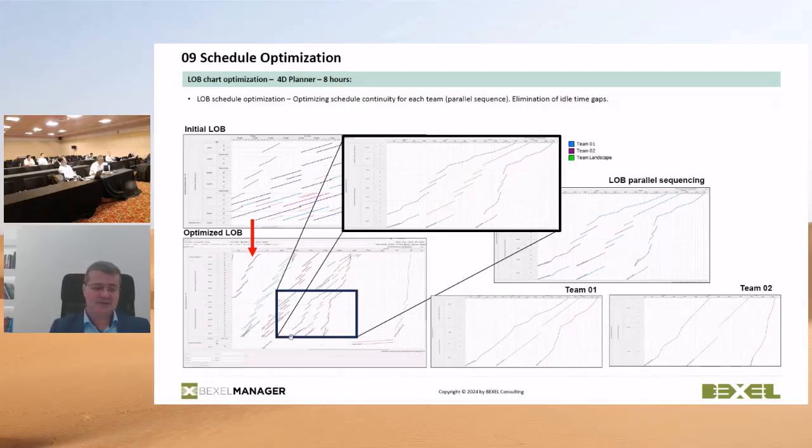If you notice that certain activities are overlapping, you know that you will have a construction issue and you would like to avoid this. So Excel automatically detects those zones, and based on that you can have more optimal schedules.